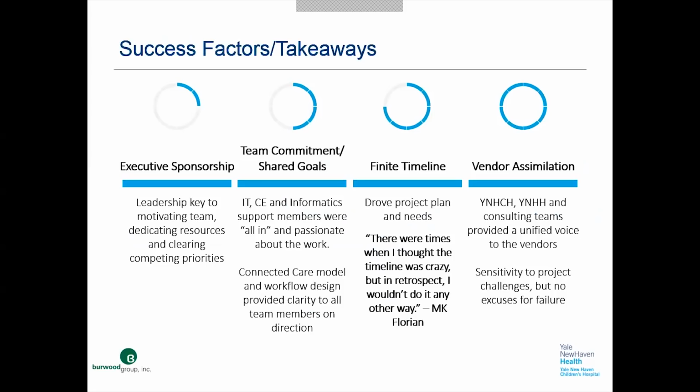The timeline, a little bit of a joke here: when we started this project, I think, Mary Kate, you were the one that said, this is nuts. Everybody thought it was crazy, but we said, hey, let's jump in and we're going to get this done. And I put this quote up here from you after this was done, that even though it was crazy, in retrospect, it would be difficult to think about it being done any other way, largely because of those resources that were involved in the project. If it had been 18 months, then they all would have been involved over 18 months. So the internal resource drain would have been significant, and we would have run much more of a risk of loss of momentum as folks kind of lost touch with the project or other priorities came up.